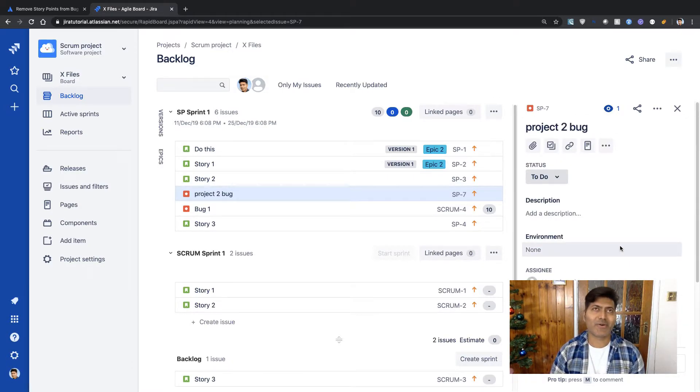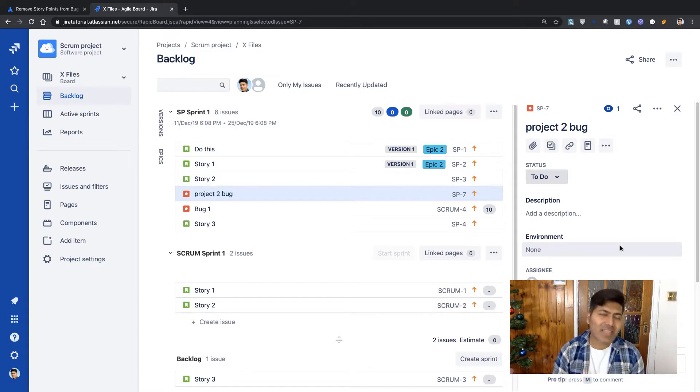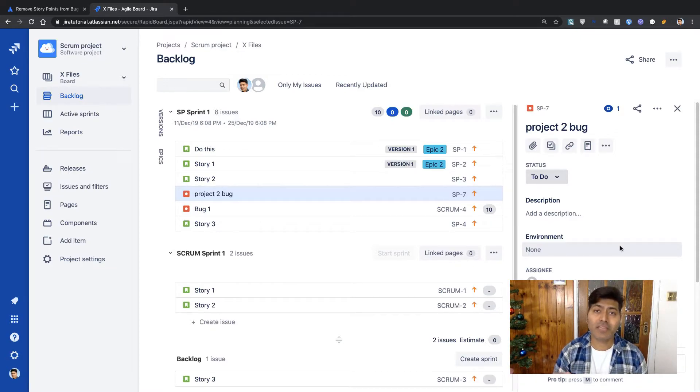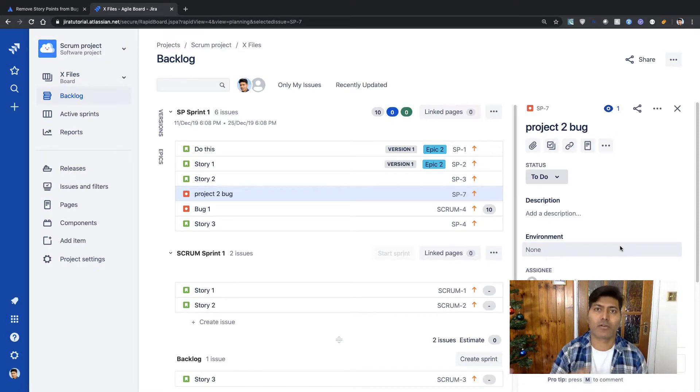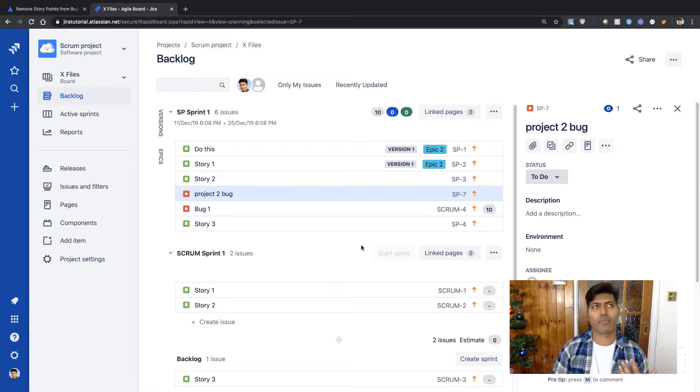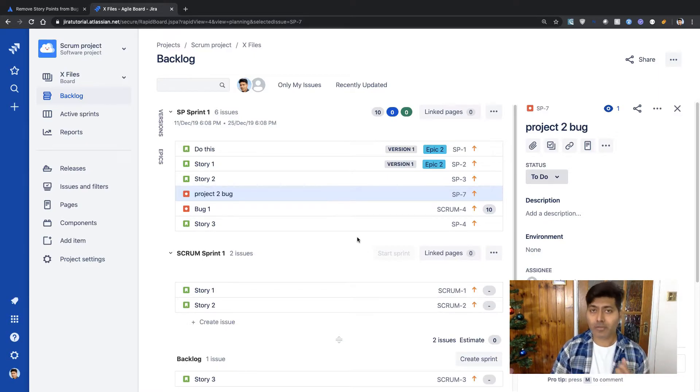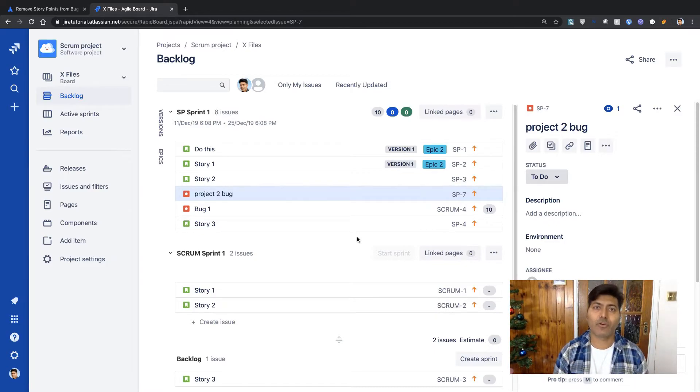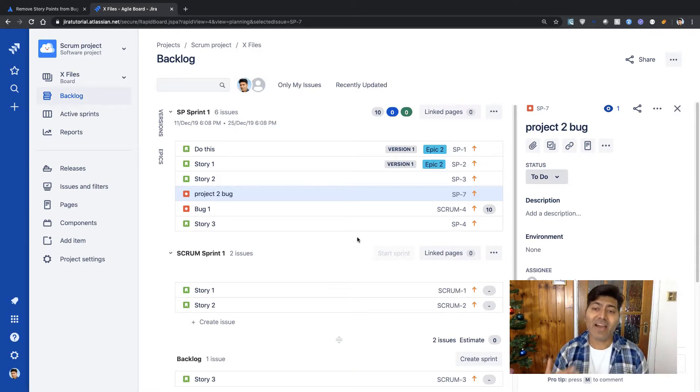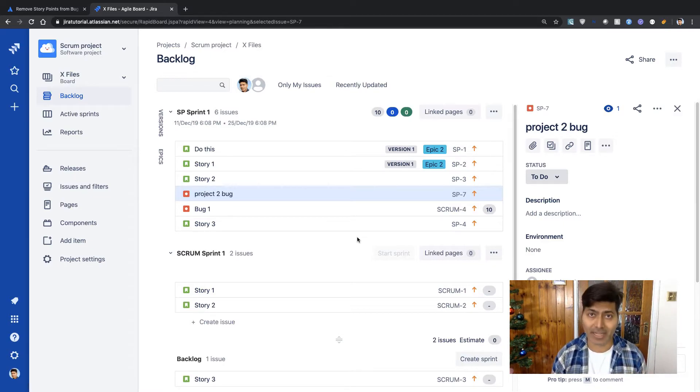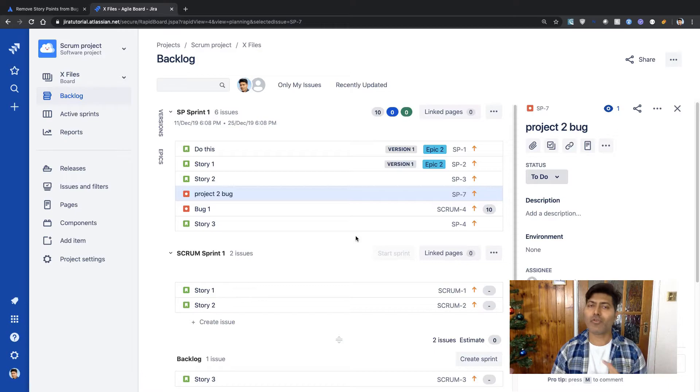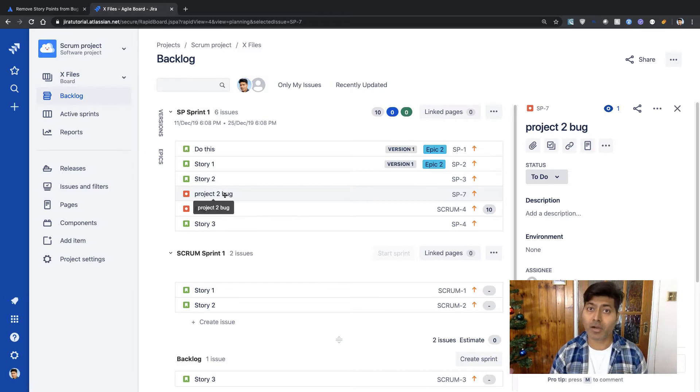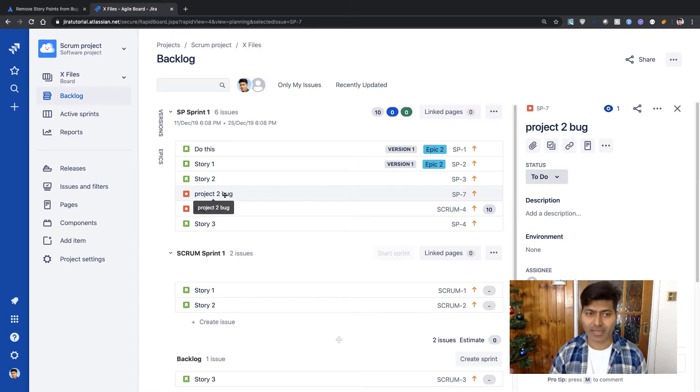The most common thing or the problem could be adding this field in the screen used in that other project in the right issue type screen. So basically you can add this field in the screen, but the problem is not really just with the screens. If you're using your scrum boards especially on cloud, you can actually have this field enabled, this story point field enabled with the help of the context. So let us also add this story point field in the other bug as well which is actually coming from a different project.